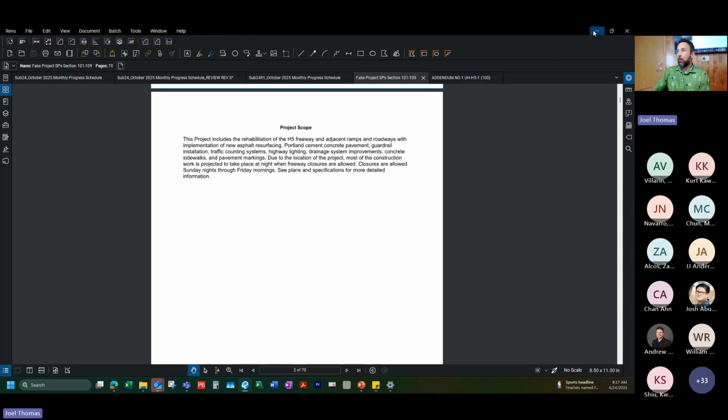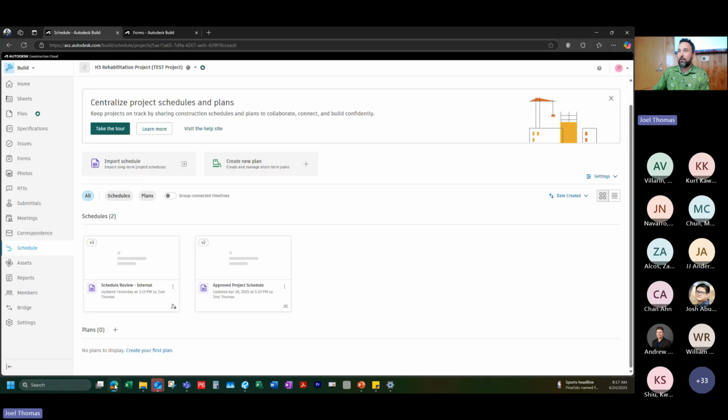And then for a little more context, as far as the start date, I set September 15th of 2025 as my NTP, so it's in the future. My first update to the schedule was at the end of September, so it was actually a 2-week update at September 30th.